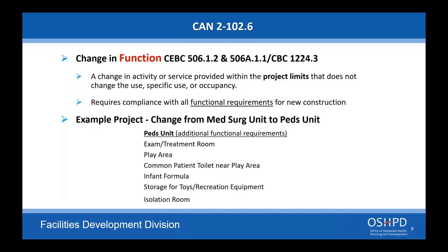But you want to put the list of procedures in the functional program when you submit the project to OSHPD, and we will coordinate with CDPH with the type of project and the list of procedures to see if they have any questions. There are occasions when we do have a meeting afterwards to discuss things that might be